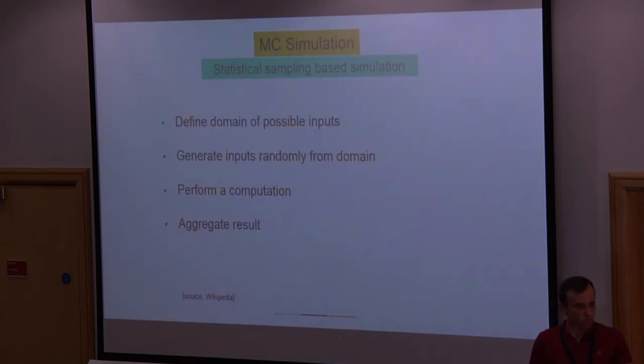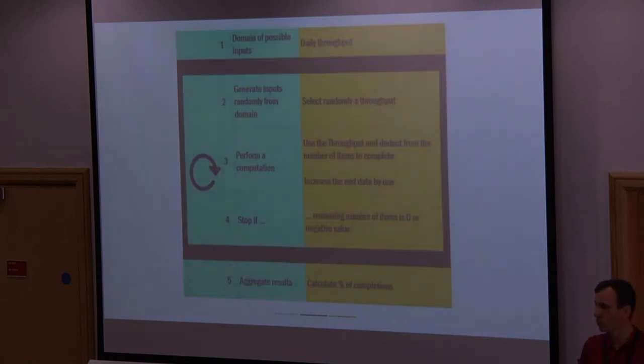Okay, so Monte Carlo simulation is extremely simple, hard to explain, extremely simple, has only four steps. You define the domain of possible inputs. Then you pick randomly a value from domain of possible inputs, perform a computation, aggregate results. In a software world, the domain of possible inputs, in our case, was a daily throughput, how many items have been done. Then we've done a number of thousands of simulations. Each simulation was taking a number from the past, done a computation and aggregate the results and produced a histogram.